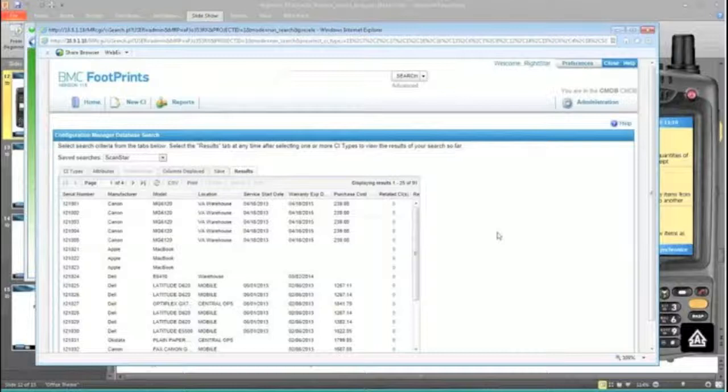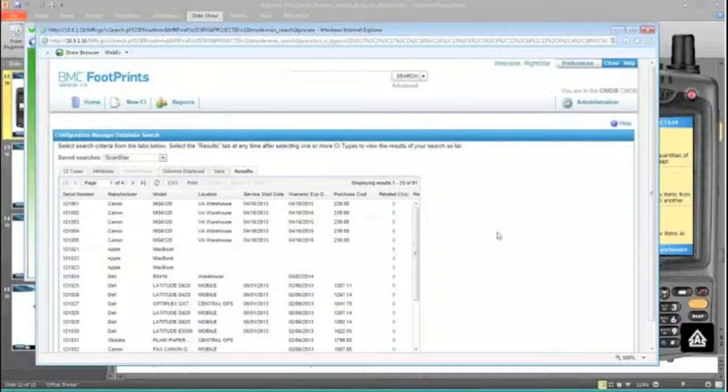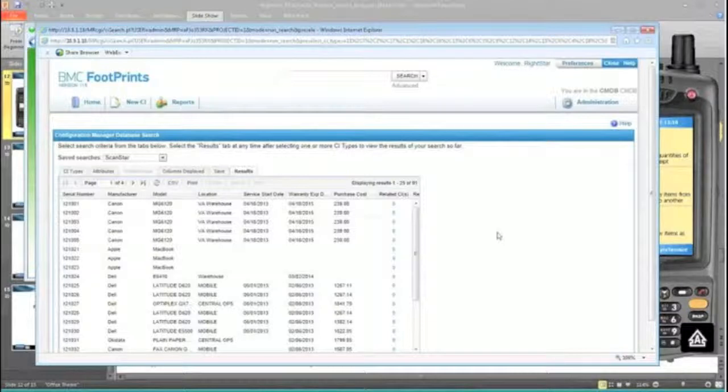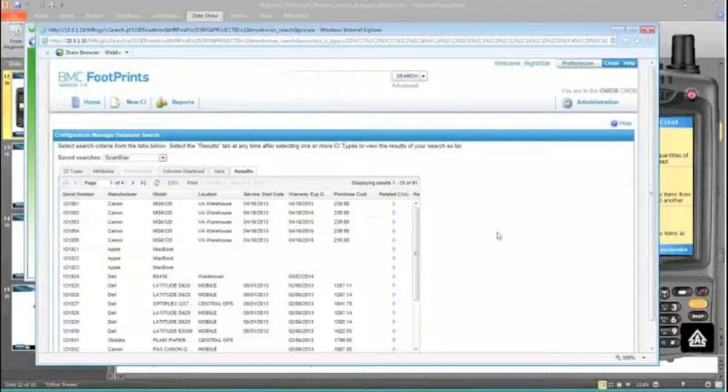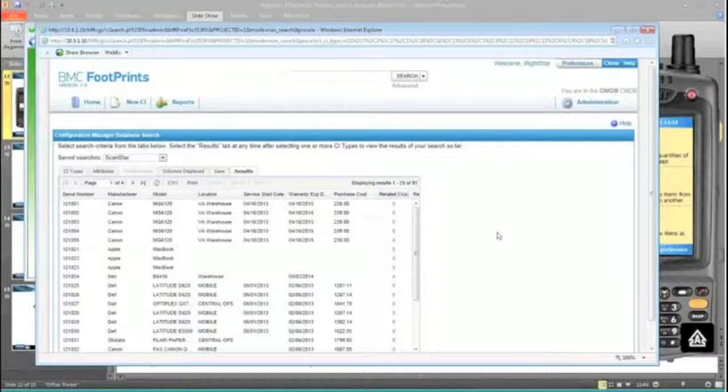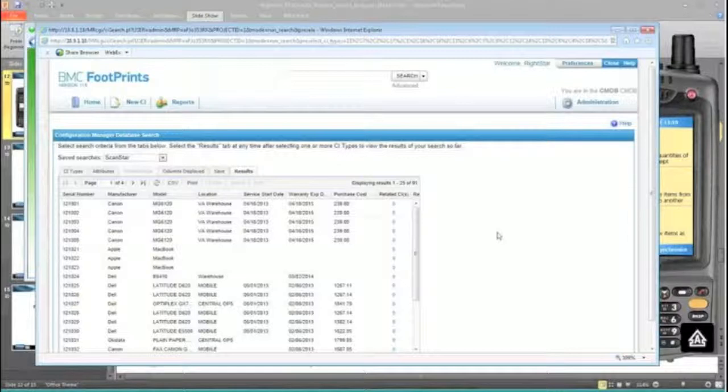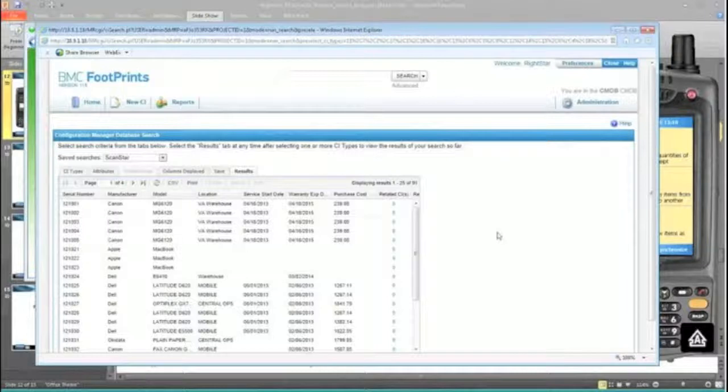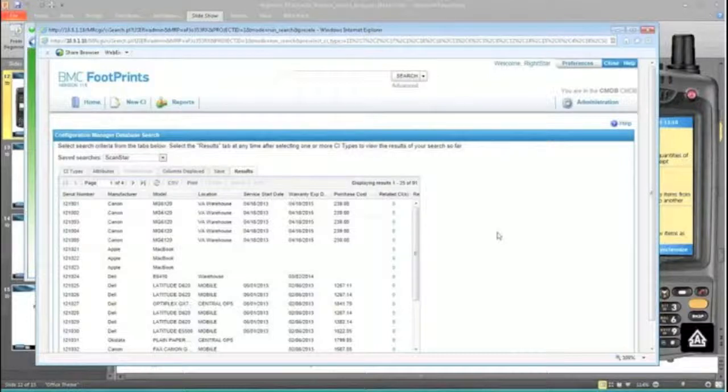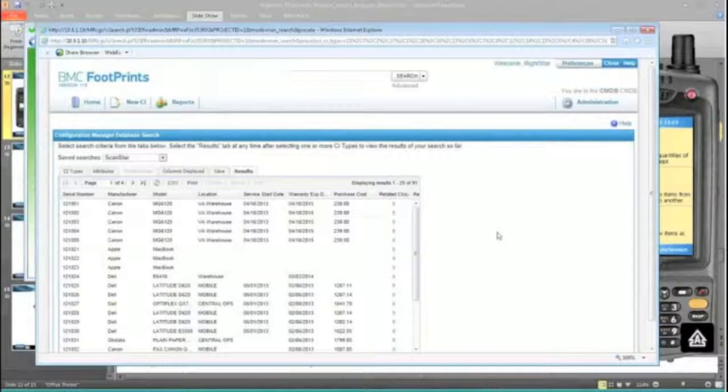There's another question here about implementation time frame. Could you describe what would be a typical Footprints Service Core implementation? How long would it take to get this up and running? Sure, and the normal disclaimer of on average is what we're talking about here. But normally to bring up a workspace like Incident Manager, so to get you trained in how the core product gets set up - the users, the accounts, and so forth - and then set up an incident management workspace with notifications and escalations, that's normally about a two-week process. Sometimes it's a little bit quicker, sometimes a little bit longer. But by the time you do it, nine to ten days.